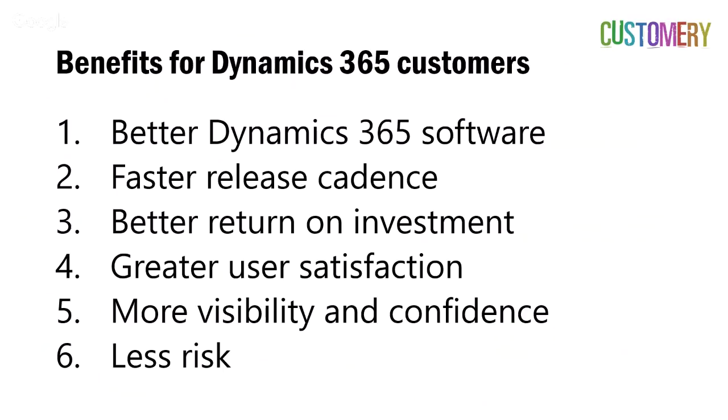I think Dynamics 365 has a faster release cadence when we're using Scrum because we can deliver a first version of the software much earlier than a traditional project. With Premier Medical Group, they weren't going to see an initial version for about a year or so, but using Scrum, we were able to deliver that initial version within a couple of months. So one of the great things about that is that the benefit realization happens much earlier.